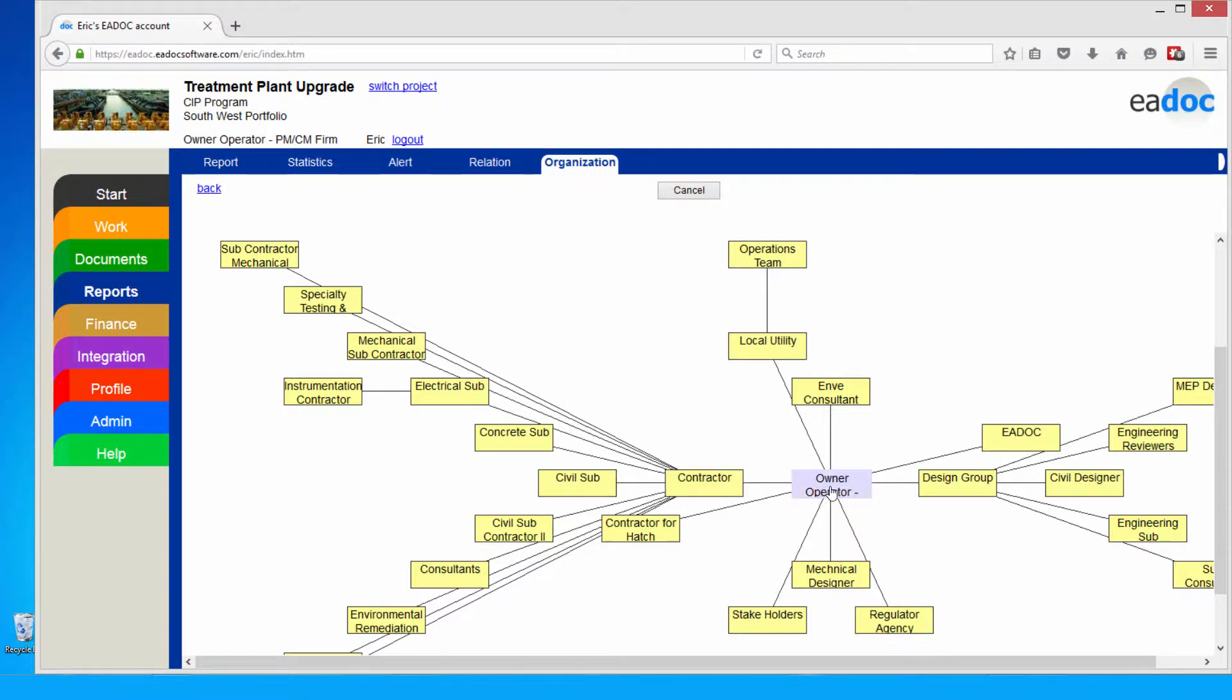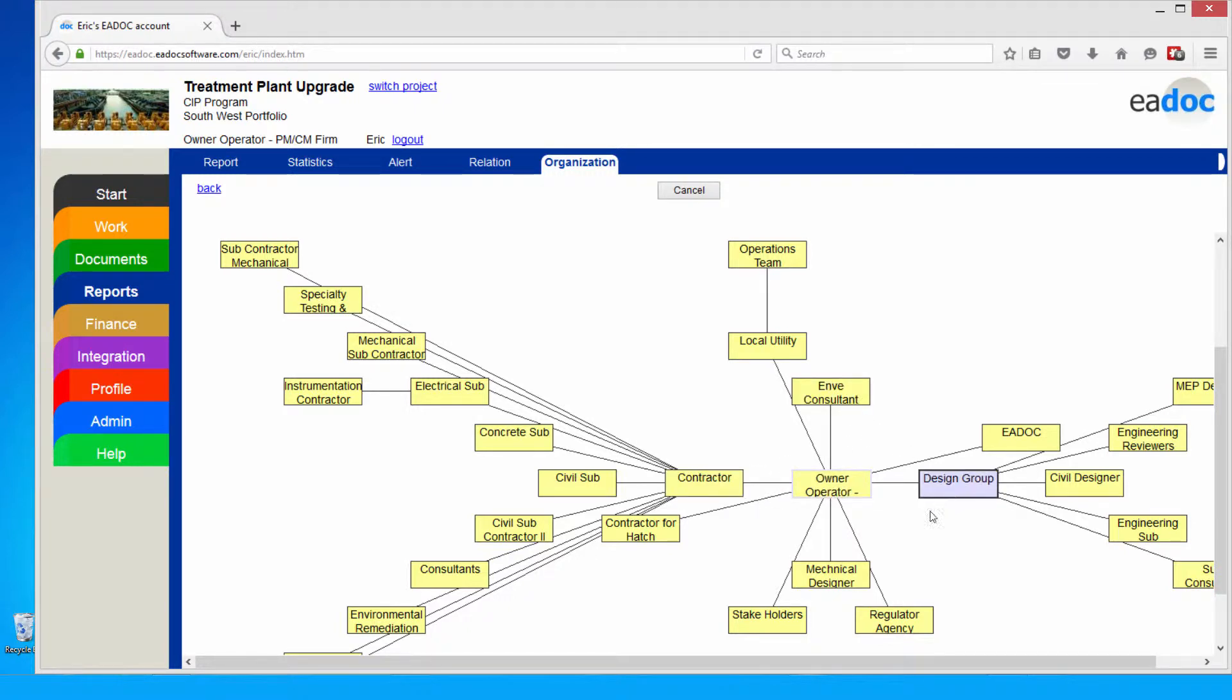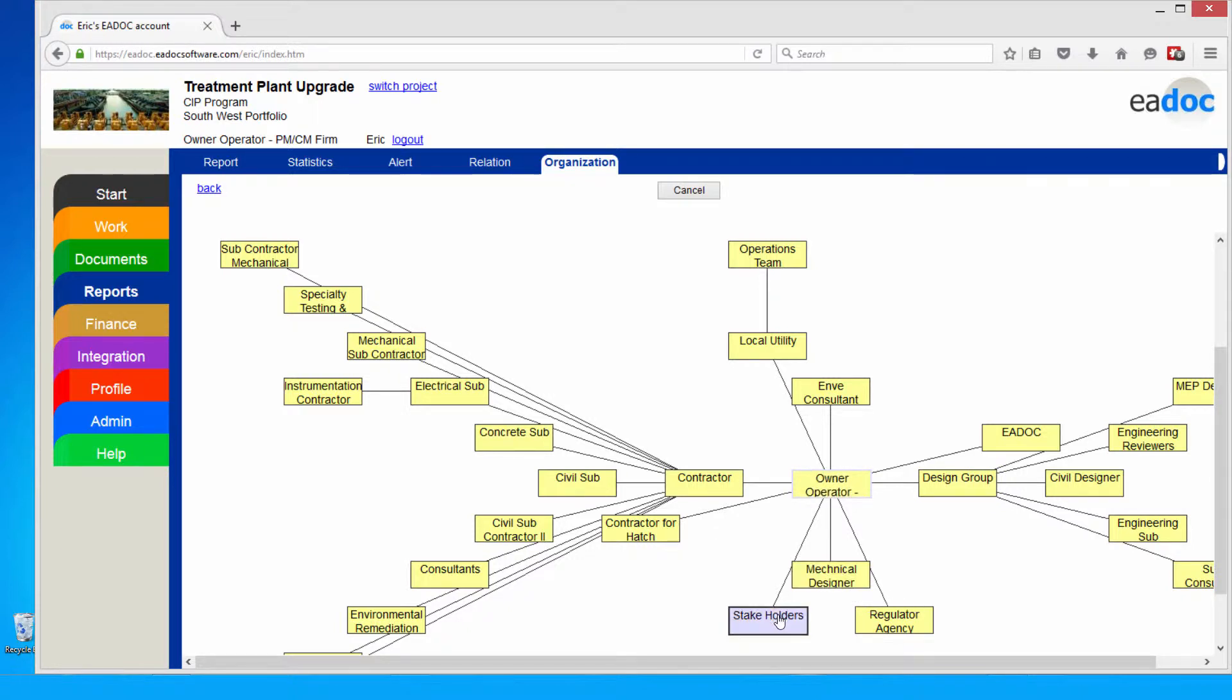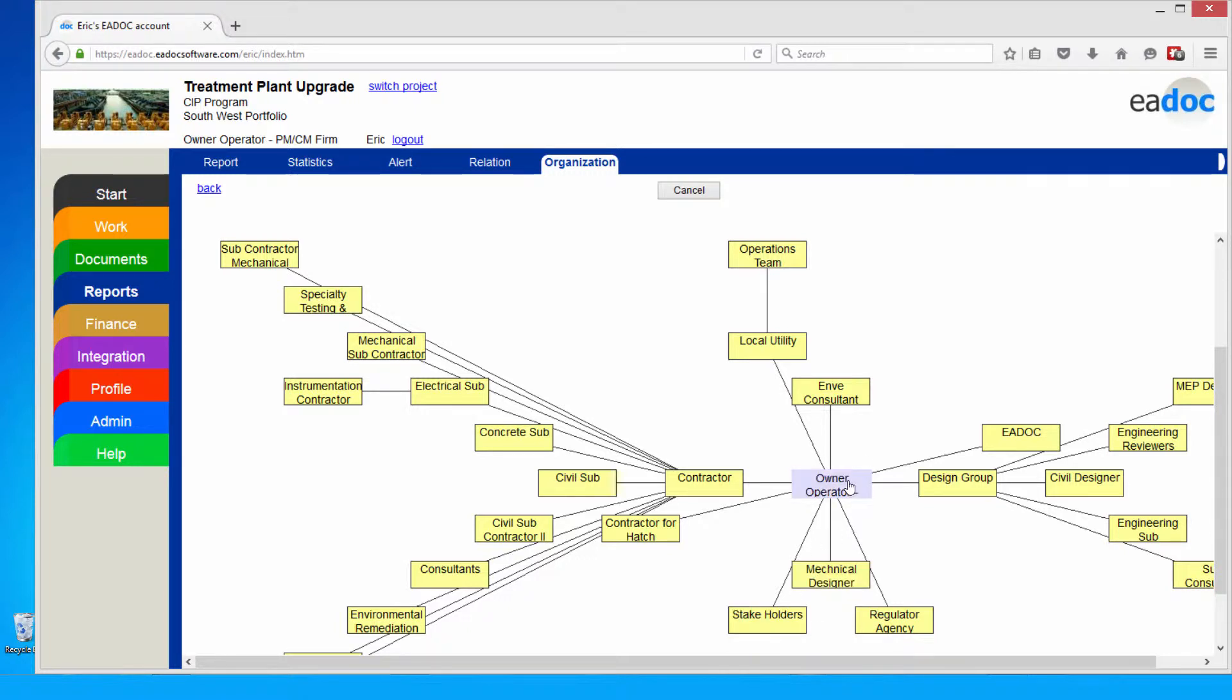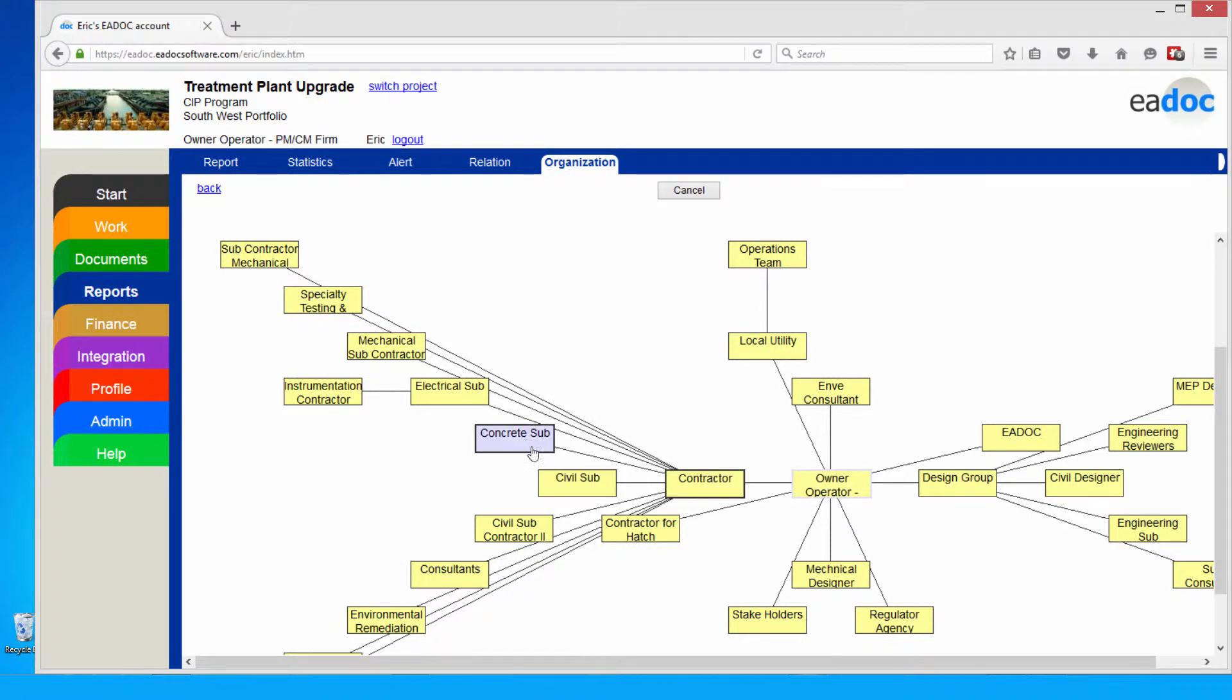For example, here I can bring on my contractors, consultants, designers, regulatory agencies, stakeholders, anybody that I'm working with. I can add to the system so I can securely share and exchange information electronically. With the application, there's no limitation on project participants. When I add my contractor, I can give them their permissions, and then they can go ahead and bring on their subs and suppliers. This way, I'm connecting the entire supply chain so I can actually capture information at the source.